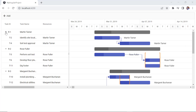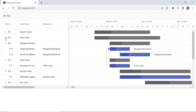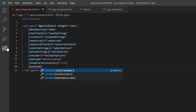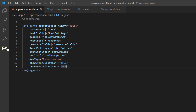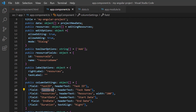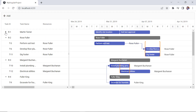Assume that the tree grid records are in a collapsed state. In such a case, we cannot visualize multiple tasks assigned to each resource. To overcome this, we can divide the taskbar for each resource by adding the enable multitaskbar property and setting its value to true. Then, in the app component page, map the task name field from the data source to the task label property to show the taskbar label. The taskbar is now divided based on the tasks assigned to the resource.